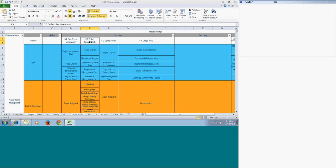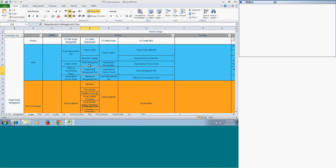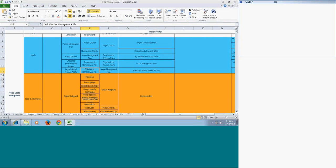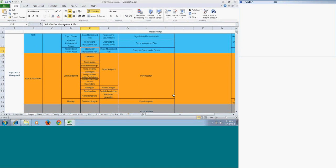For the Collect Requirements process, the inputs are the project charter, stakeholder register, scope management plan, and the requirements management plan. The stakeholder register is included because it gives you the list of stakeholders who are responsible for providing requirements. The scope management plan and requirements management plan help you execute as per the plan, and the stakeholder management plan also comes into picture because you are dealing with the stakeholders.